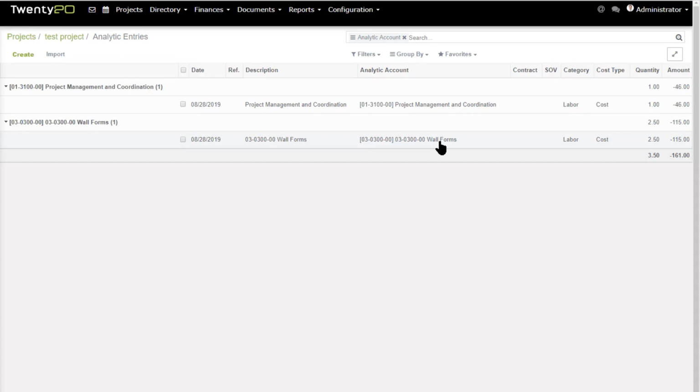So now that leaves you with job cost entries into your project. It does not make any general ledger entries. These are job cost entries only. And they're negative numbers here because they are costs. Revenue entries, you may recall, show as positive numbers.